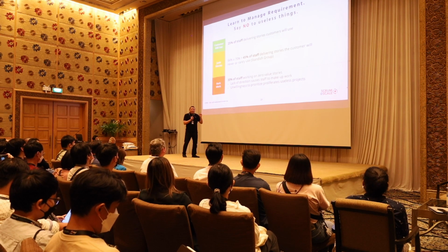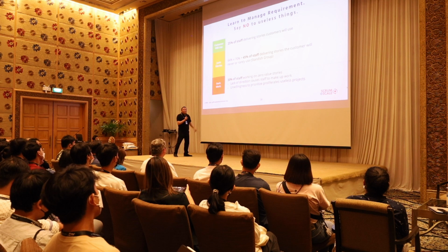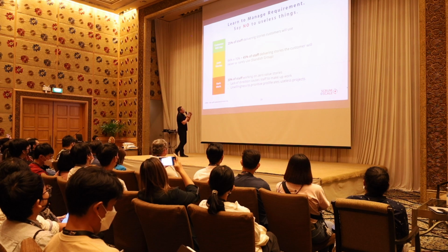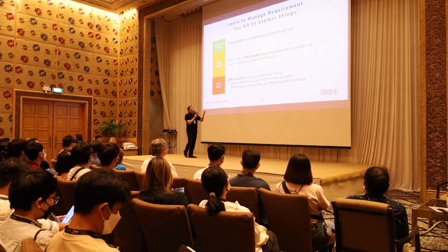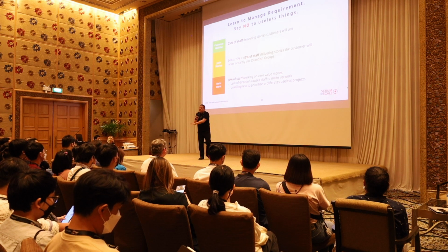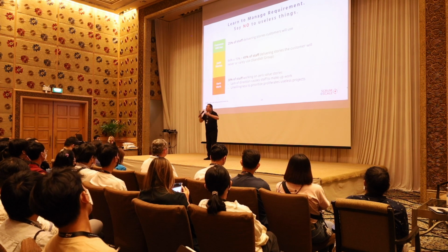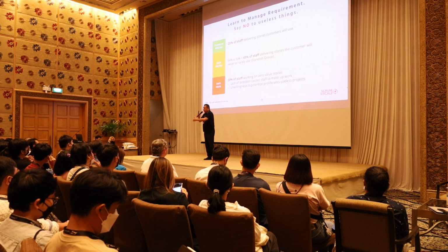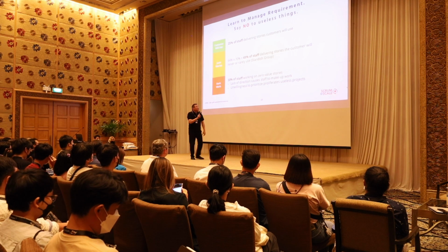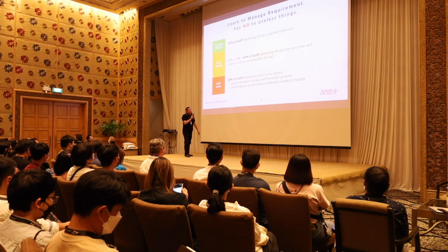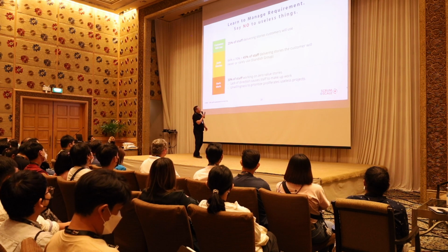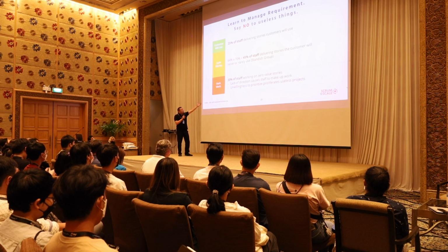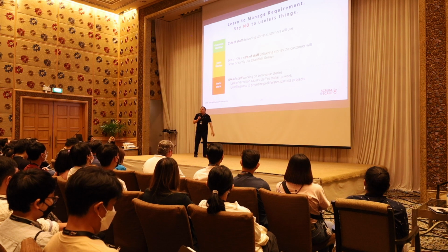And one of the things he realized is that most of the time, what's in your product backlog doesn't feel right. Only 25% of the staff are delivering stories customers will actually use. And this is not about you, this is not about Thailand, this is about the entire world. Every place that Dr. Sutherland went to, everybody's having this problem, right? And 45% of staff are delivering stories that customers will never or rarely use. And worse, a third of the time your staff are working on zero value stories.